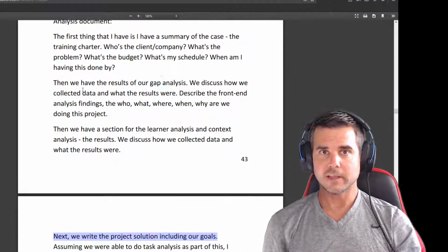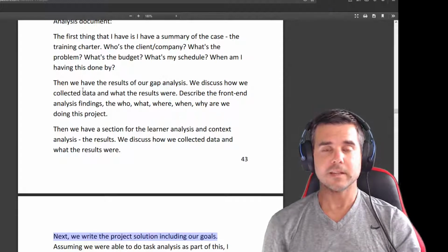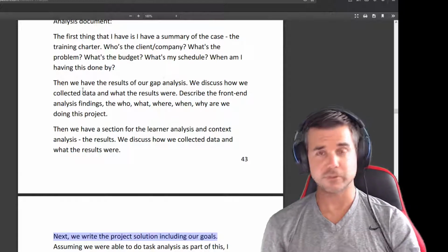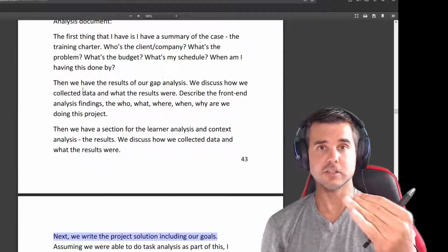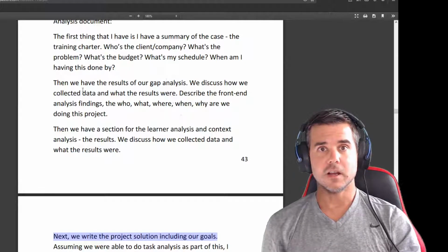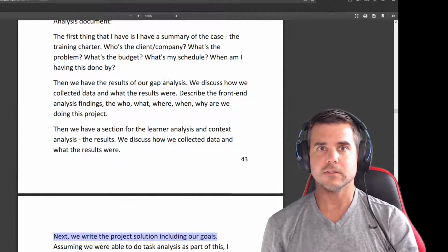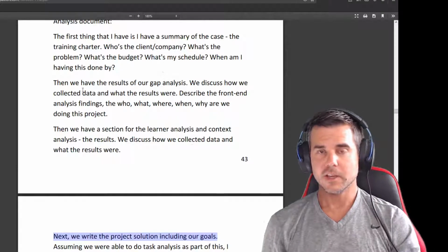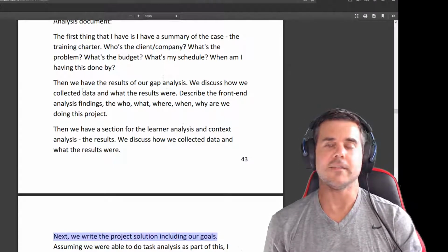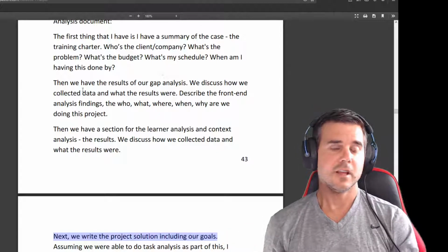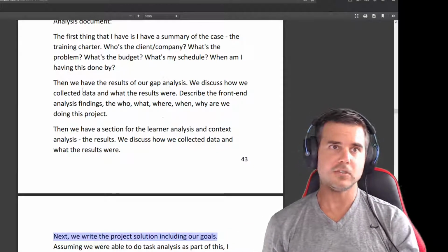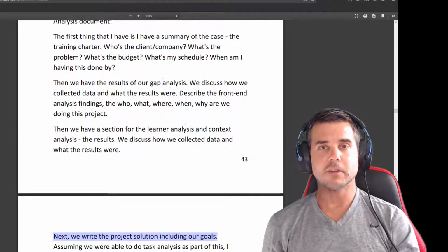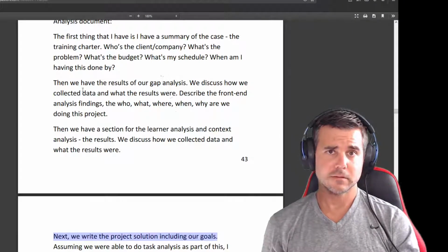So I do things like that, but you have to break down your budget pretty in depth. You have to tell them this is how many hours each of these deliverables is going to take, and why it's going to take that amount of hours. And you have to tell them what the rate is. I do not like fixed costs for big projects. If it's a $5,000 project, I'll give a fixed price. But if it's a 15, 20, $25,000 plus project, I'm going to break it down hourly and charge them an hourly rate.